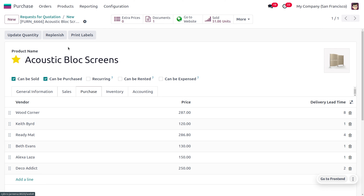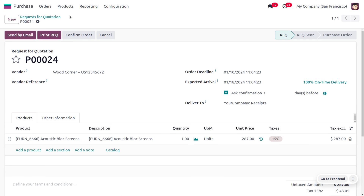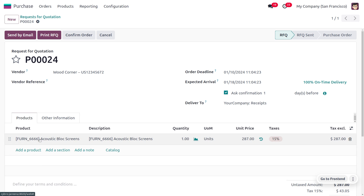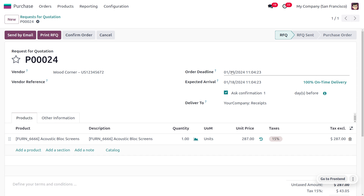With a delivery lead time of eight days. When you look at the RFQ, you can see that the delivery lead time is also shown here. Since today is the 10th of January and the delivery lead time is eight days, the expected delivery date is the 18th of this month, which is shown here.